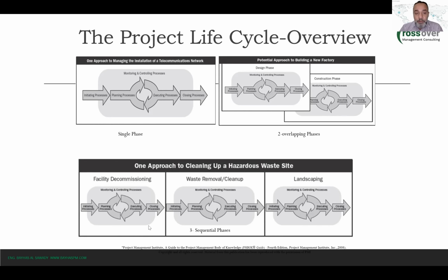And probably you will have here 3 charters, for instance, and 3 plans for each phase, right? And you will have checkpoints. Where will you set your checkpoints? Between every 2 phases, you will have a checkpoint or a phase gate or a kill point, as we mentioned, right? In order to make sure that we are proceeding as we should be proceeding, right? Does that make sense, everyone? Okay, any question?